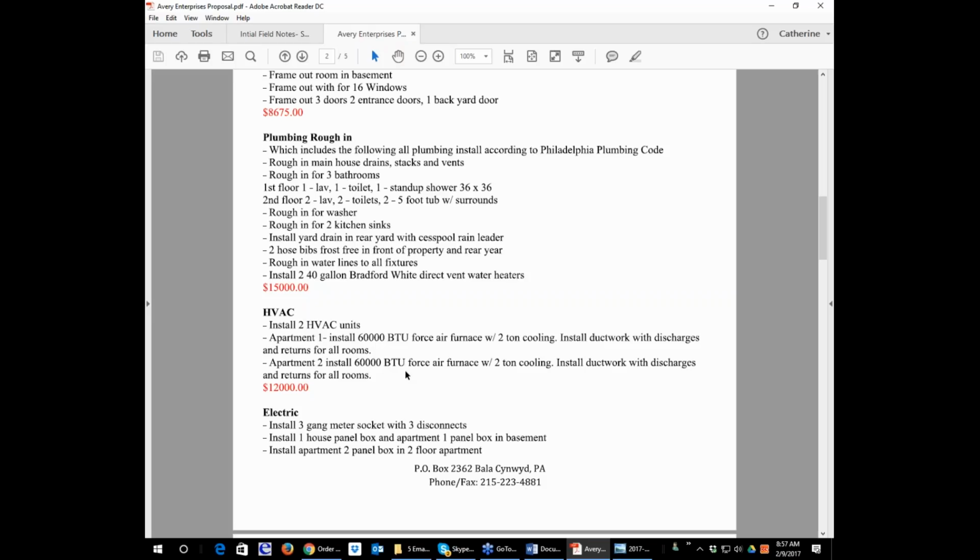60,000 for the apartment. I don't even want to put a 60,000 BTU unit for an efficiency unit. I just want to put in one of those Lennox wall units that are operated by electricity that will provide HVAC to that area, and then I want to put a baseboard radiator in the bathroom. And that would save the client some money. So how many like the idea of putting in one of those Lennox wall heating units in the ground floor apartment, and just an electric baseboard heater for the bathroom, and then a 125,000 or at the very least 100,000 BTU heater for the house? Doesn't that sound like a better use of the money?